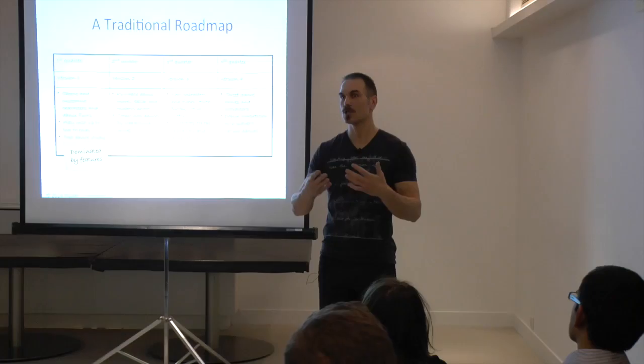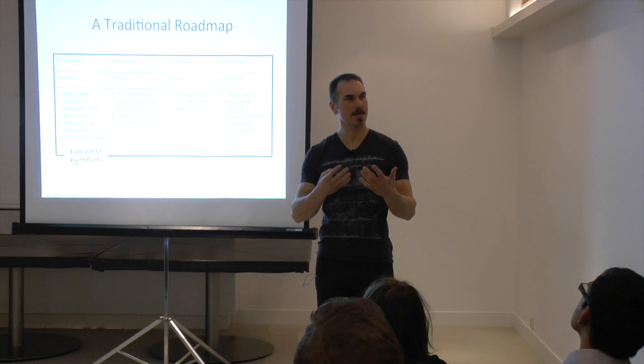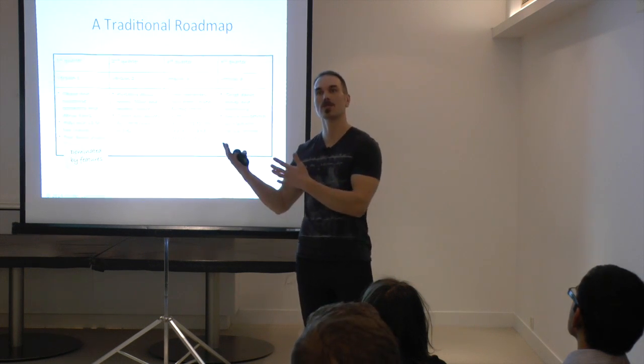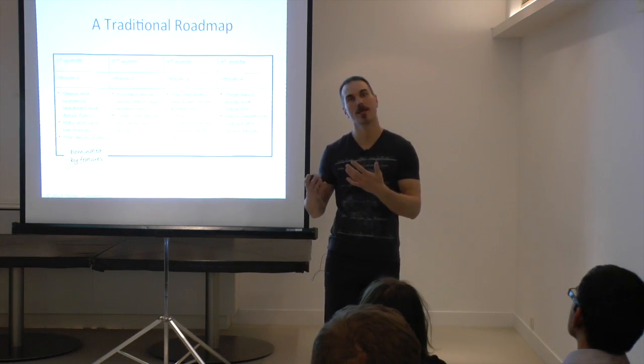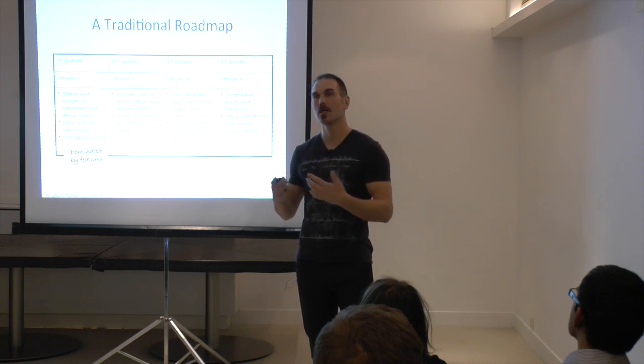There are lots of features on there, often too many features, and often those features I find are too detailed. That makes it difficult really to see a coherent story and see how the product is likely to grow and evolve, and it in a way turns a strategic product planning tool into something more tactical. And there's an overlap then potentially at least with the product backlog, with the user stories and epics in your backlog.